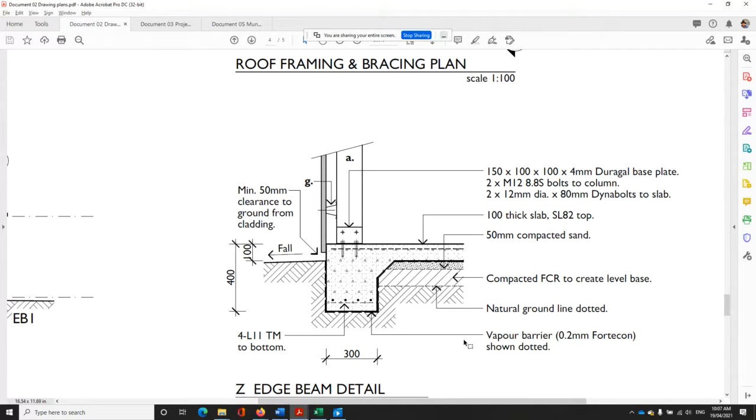In the first case, my slab is 7 by 6 into 100, 300 by 300 foundation, but now I'm doing 400 by 300 foundation. Slab is offset by 400 mil on all the sides. So my slab will be smaller because I took that depth into the foundation. Is that making sense? Actually, it will be the same thing. The volume that you're going to get will be the same. So that's how you've got to calculate.